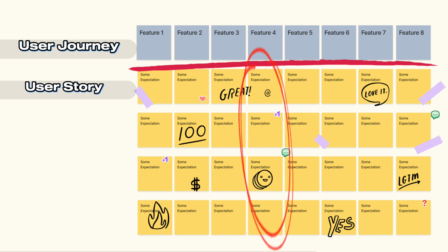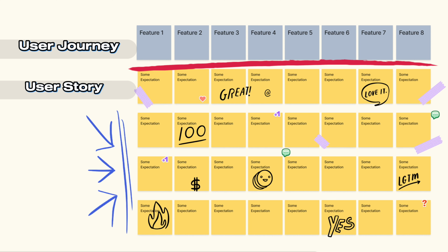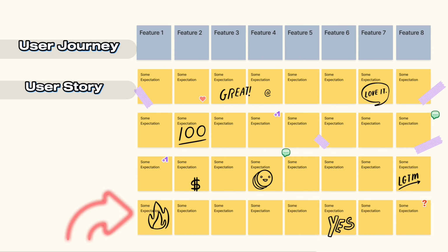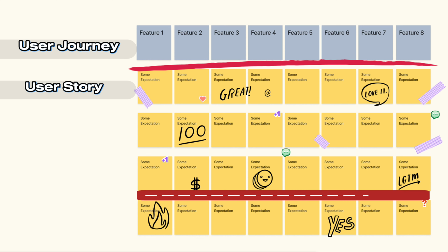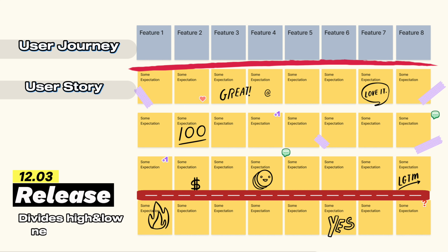These form the ribs. In common practice, they are vertical lines that start from the spine and could be endless, depending on imagination. And the last important thing here, the release priority filter. This is one or multiple horizontal lines that define the priority indicator for the release.